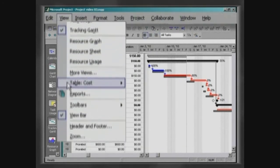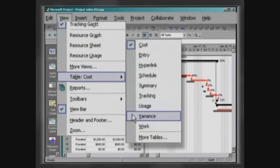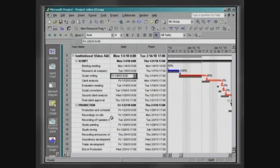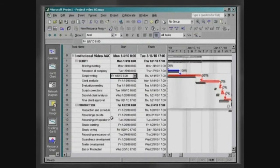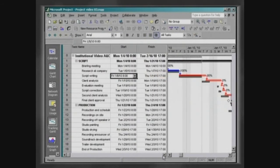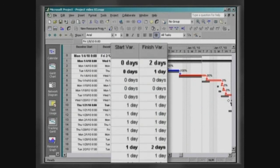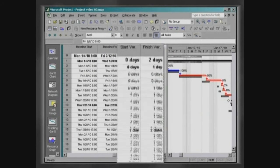Click on View, Table, Variants. Apart from the chart, you can check the delay by observing the columns Start Variants and Finish Variants.